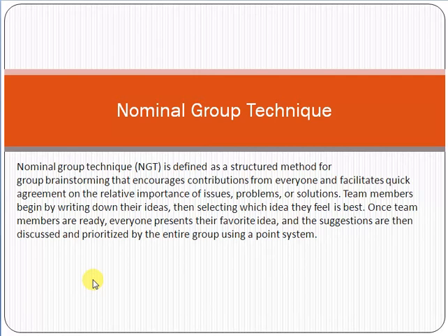You as a project manager, other technical resources, and the deployment team, 5 to 6 people, can sit together in the meeting room, and you give every person a chance to give his idea and thought. One by one, every person can stand up and give his thoughts and ideas about why the problem is occurring and what the issue is, and you can give a score to his ideas and thoughts.